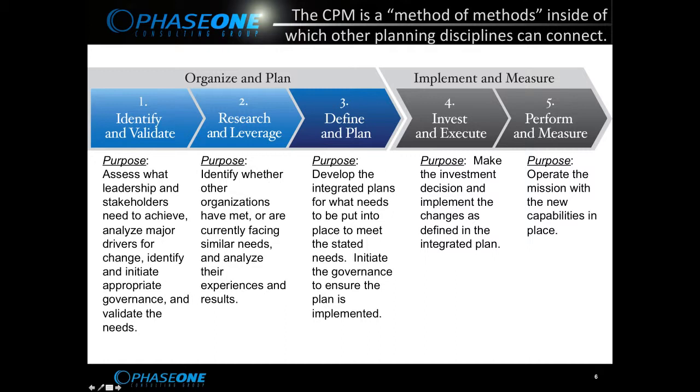So step 1 is about understanding the leadership intent, working with stakeholders and really drilling into the drivers and understanding what really is intended, what really can get to the leadership intent. Working with the right governance groups, either standing up a new governance group or working with an existing governance group to then carry back this interpretation and to get sign-off out of step 1 that says that our understanding is the leadership intent is to have fewer injured police officers, and our interpretation of that is that we're going to work on integrated radio equipment as being a primary driver of that, and getting sign-off on that.